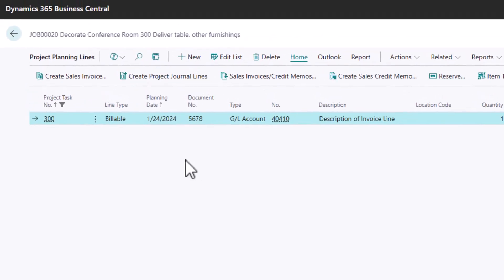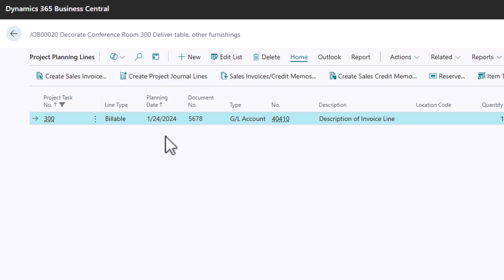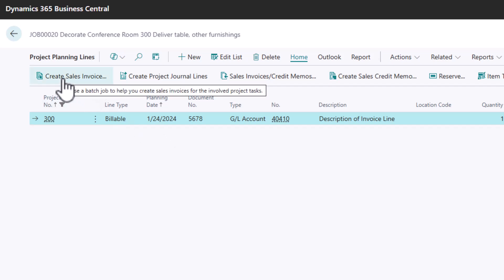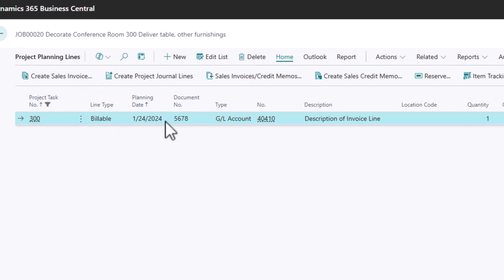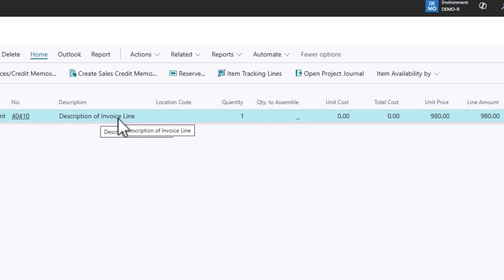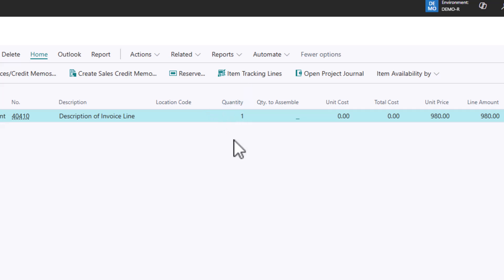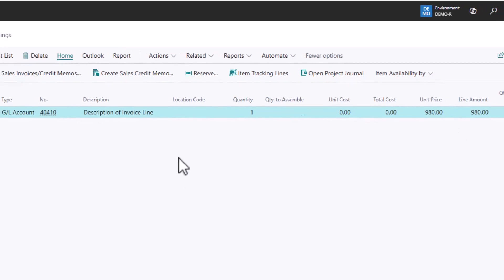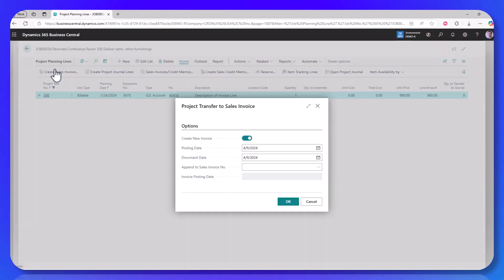The thing that marks the activity as a billable event is this billable line type. With that field set, the system knows that when I hit create sales invoice, this line is going to use a description. And you do want to be careful here that your planning line's description is what you want on the invoice. So I have description of invoice line as a demo to show you what's going to happen. Just a single quantity and then a unit price, because it's a quantity of one. That's my line amount.